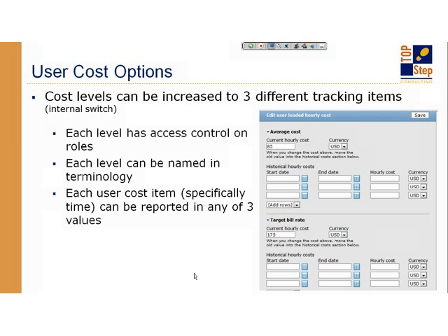So typically we get the question of, well, I'd like to have the best of both worlds, so how can I do that? Well, OpenAir has the ability for you to actually track more than one cost per person. And the huge advantage of this is not only being able to have one that's very close to salary, and then one that's more of a banded cost, maybe a PM one that you can share for banded and a salary one that you share with executive management. But you can also control who has access to these costs by the role definition. When a person logs in and they are assigned an OpenAir role, you define which costs they can actually see.